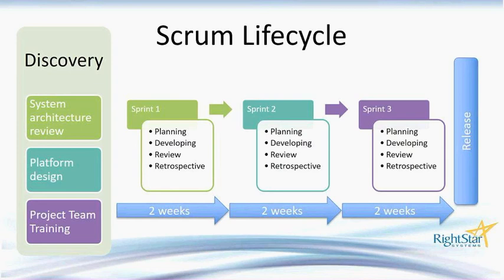Make sure that your team is prepared for whatever platform that you're designing on. And then as you look at your requirements, these requirements are built typically into what we call user stories. The user stories are single requirements. Those requirements are then prioritized.